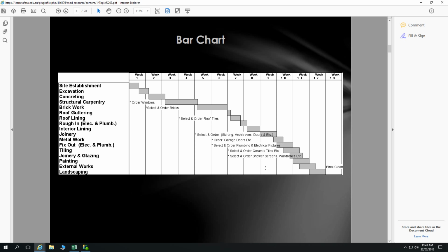It has to happen very quickly, so everything has to be very well organised, and that concrete, you're not going to be pouring one section of concrete and then pouring the next section 8 hours later. It has to happen as a continuous thing. But we've got our 7 days of curing happening there. Our structural carpentry. Okay, complex house.